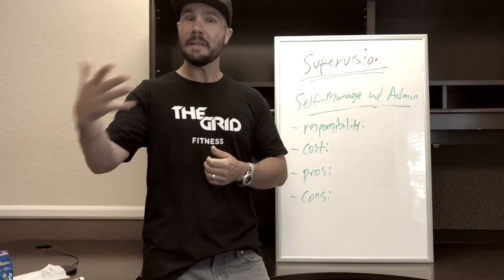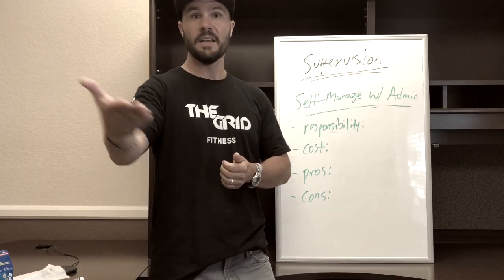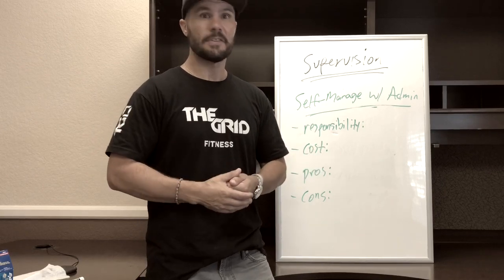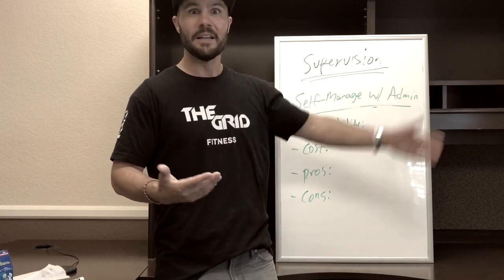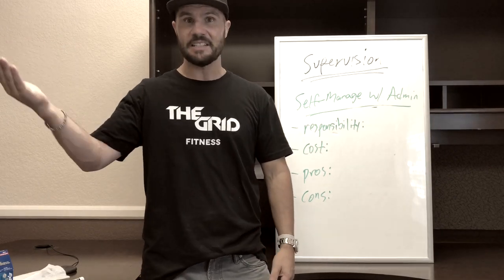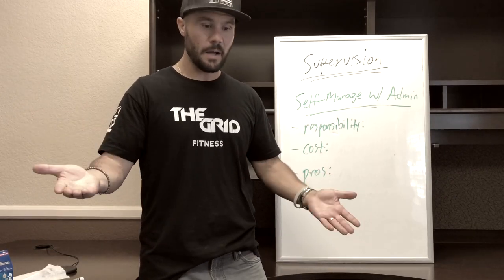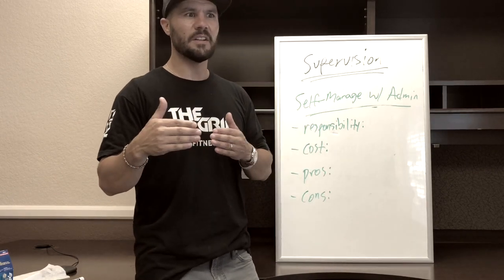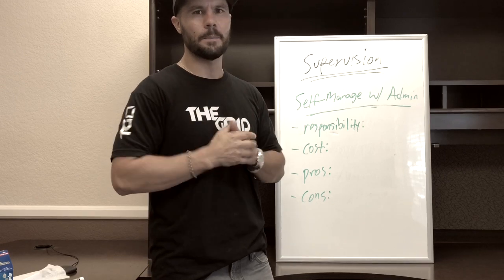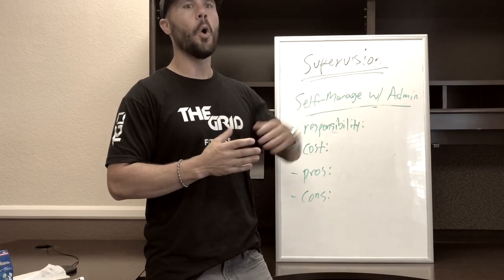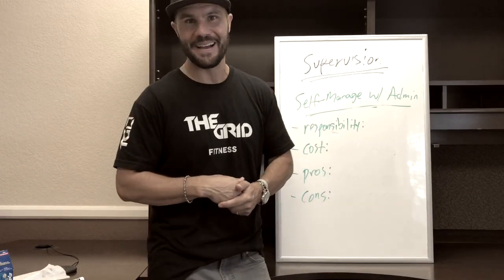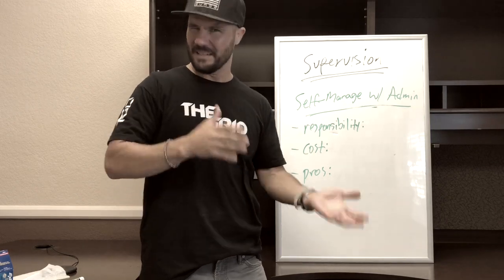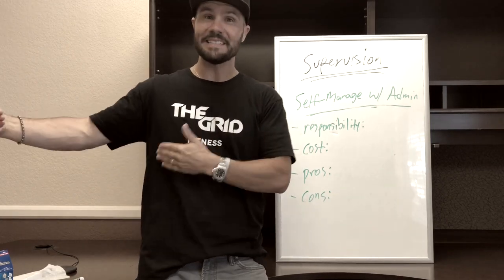Some markets are more friendly to GCs and builders. For example, in southern Utah, I can get a builder to build me a $1 million home for $25,000. A builder. In Phoenix, Paradise Valley, Scottsdale, same house, it costs $150,000. Because there's a high demand for builders in Phoenix. There's an oversupply of builders in southern Utah. Price comes down, right? It's all supply and demand. Okay, so does that make sense? So markets will also dictate what you do.